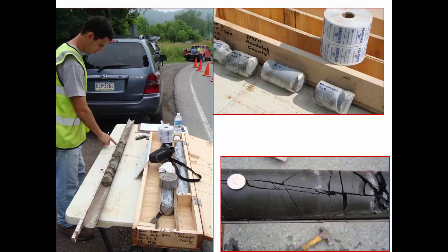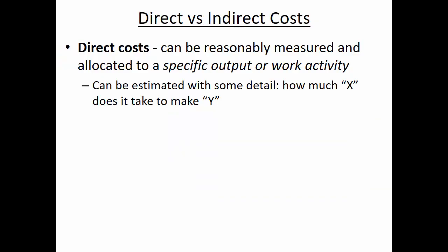But the one who I ended up selecting had a more detailed estimate. He actually measured the exterior area of the house, knew how many coats of paint there would be, noticed where scaffolding was going to be required, and actually took the time to put together a detailed and thorough estimate. And that had a lot more accuracy and built more confidence in me.